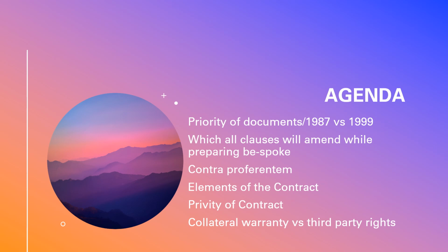This is mainly when there is a conflict, dispute, or a clarification requirement; we will follow this priority. Again, one more thing, even though there is this priority of documents, it's clearly mentioned in the FIDIC that these documents are expected to be mutually explanatory. So these documents define the full contract. Okay, and the contract is supposed to have the precedence.